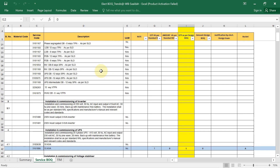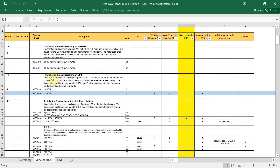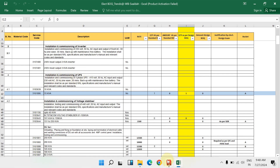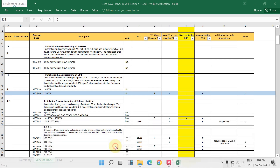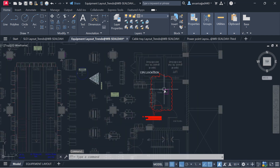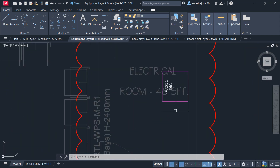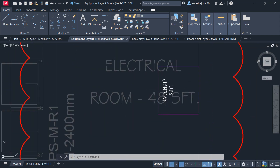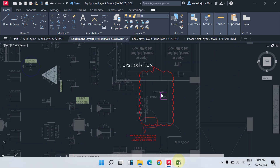The first item is installation and commissioning of UPS. In our project, if you open the equipment layout, you can see the UPS location is shown in the electrical room and the capacity is also given — 15 kilovolt ampere UPS.